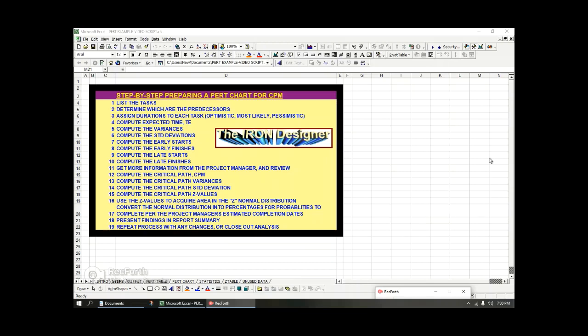And the first thing you need to do when you're assigned a project and you're working with a project manager, or you are the project manager, is putting together the list of tasks. And so you're going to have some initial tasks that have to get done first, such as materials arriving at your construction site, or even if you're machining some parts, machining some goods, you need to start by listing those tasks first.